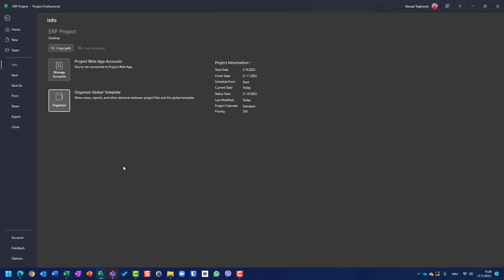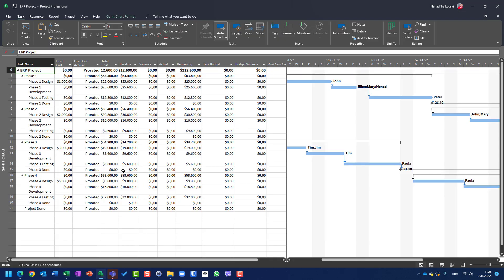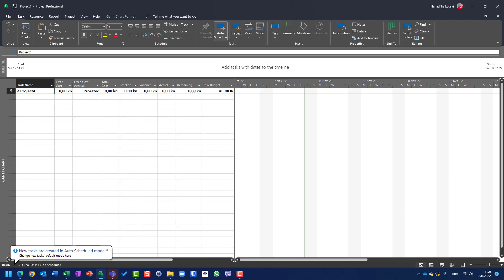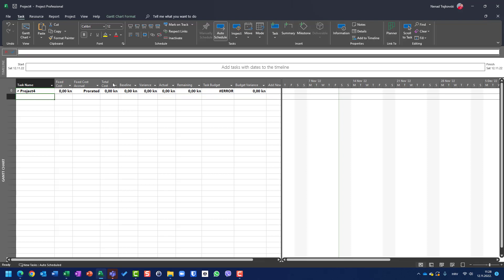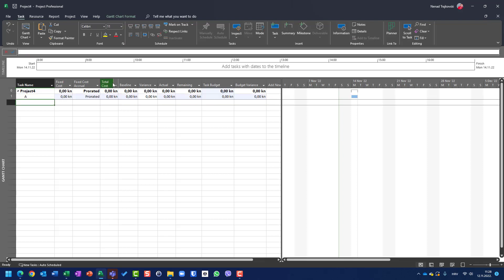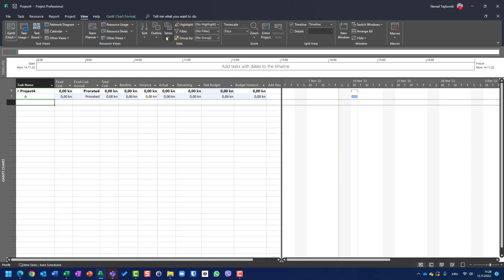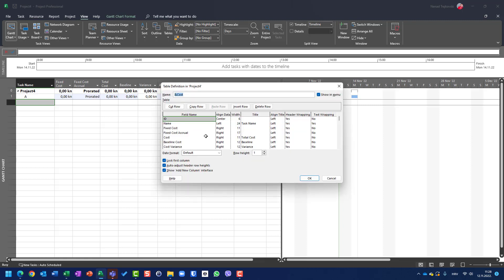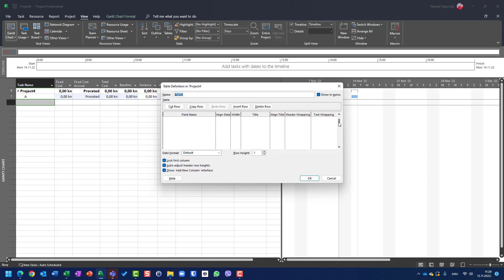But what if I want to remove them? First of all, I will close this project, then open a new project. I'll say show me the cost — and I have task budget and budget variance here. Let me create Task A. So let's say I don't want them for any further projects. What I will do: first, go to View, then Tables, then More Tables, then Cost, and remove those two fields from the cost table.